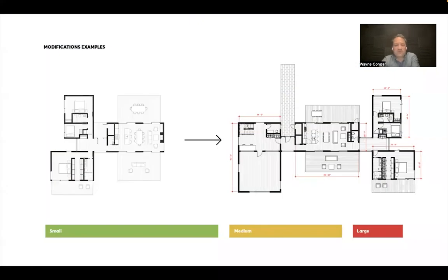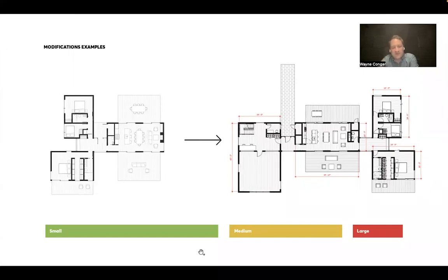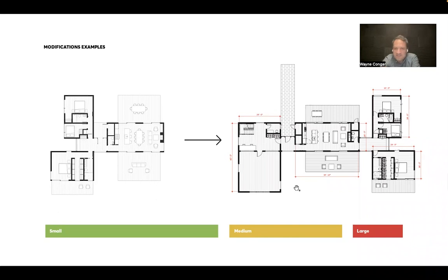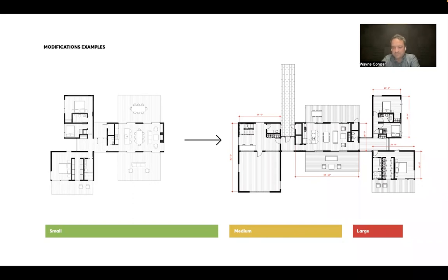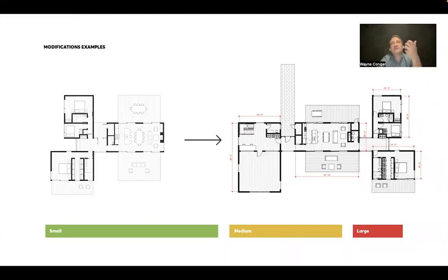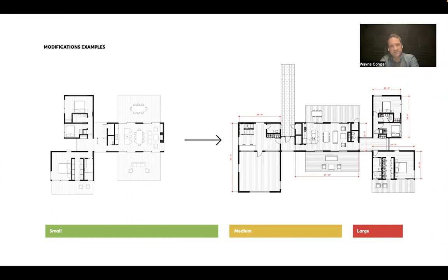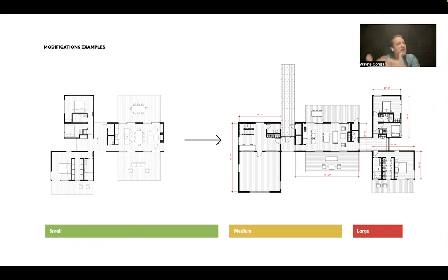And so we had to re-scope the project and we had kind of a whole custom piece to help develop this element, bringing in the outside resources we require and also figuring out how to merge our standard piece, which you see on the right, which is essentially an out-of-the-box village home, connected to this custom studio. And so you can really start to see that here in plan, that on the left we have our standard. And yeah, there are some like some mirroring, some shifting in the house side, the right side of the plan here, which would kind of qualify small and medium revisions. But the entirety of the studio is sort of its own thing. It represents a large modification. And so hopefully that gave you a look at the reasons we modify houses, the degree to which we're able to modify homes to make them contextual, make them unique, make them yours, and make them fulfill your requirements, both on the budget side and the space planning side. And also gave you some context on what starts to feel like big changes or sort of custom things and what we do about that.